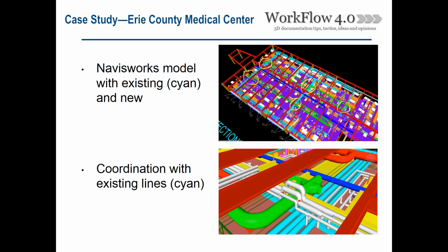Also, they had told me they needed 12 cleanouts, and when I looked in the scan data, there were actually 14. So we were able to identify where those were with the scans and figure out how quickly they could make the holes rather than having to redo all the drywall work and the tile work.